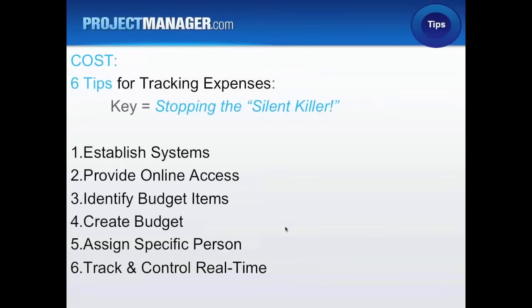And then even at that, if I'm allocated 60% to marketing, I could be working on multiple projects. So you keep having to break it down. You have to know how many hours that Jennifer Witt or your resource is allocated to that project. You have to keep going down to the number of hours you have available for that resource to work on your project.